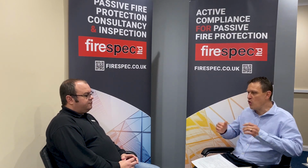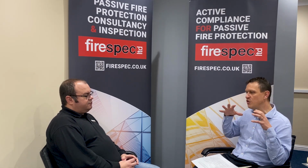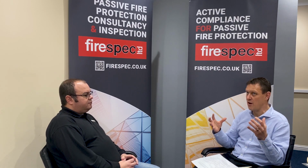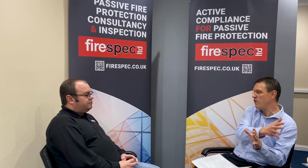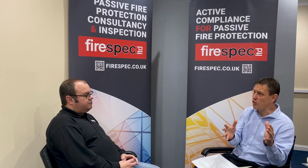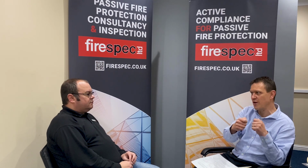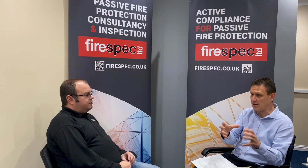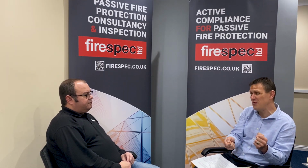So where the hard work's gone in, and especially where these contractors have learned to engage early. I'm talking about some of our biggest clients, on the last 4 or 5 projects of theirs. They now literally talk to us before they've even secured a project. Yeah, they're in preferred bidder stage. Yeah, and I don't mean we're in competitive tender, they know they're going to come to us. As soon as they've got sight of that contract, they're like, right, there's what we want you to price, and then they'll give us an order before a spade is stuck in the ground.